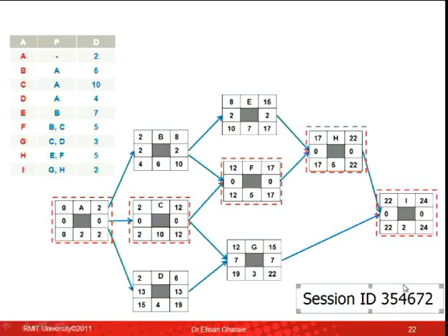Why do we do that? Because when you calculate the total float, then finding the critical path is super easy. You just follow zeros. Look at this, 0, 0, 0, 0, that's the critical path. So you just look at the network, you follow the zeros, that's the path.